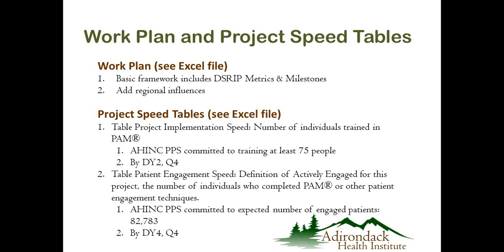So for project speed, we'll be looking to determine at what point in time each organization that's taking part can commit to meeting all the requirements. Ideally, DOH wants to see kind of a ramping up. So what they're looking for is that we're working with several organizations and that some of them will probably meet the requirements a little earlier than others. But overall, they would all have to be by that point in time of the end of 2016.